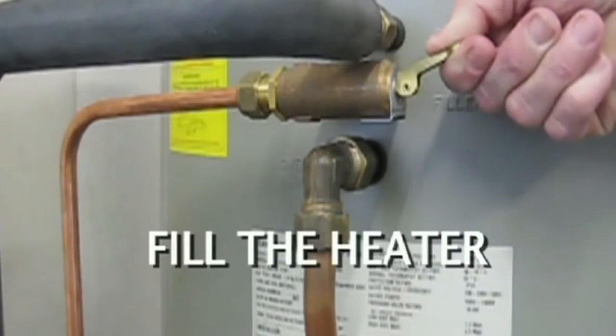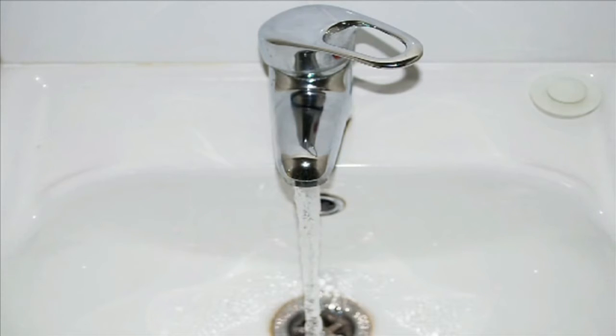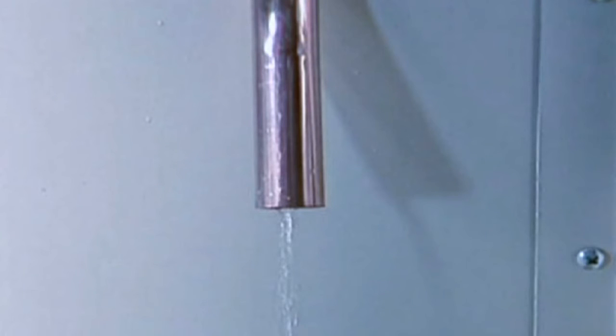Fill the tank with water. Just because water runs from the reticulation pipes does not mean that the tank has been filled. Water must flow from the overflow pipe.